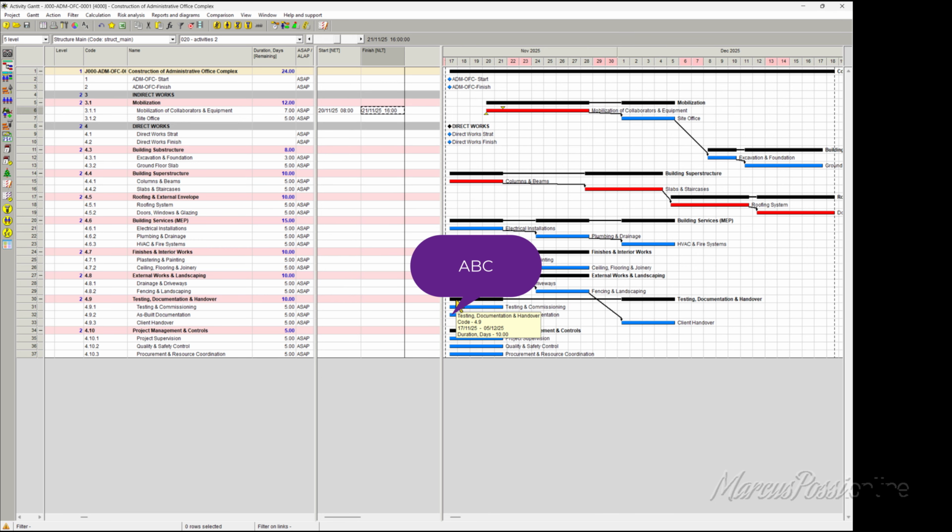Just press OK, and you see the sequence, and these 2 days are not work days, so even if it is continuous work, it will skip, because although it's continuous, it is continuous under the rules of my predefined calendar. Mamani, this activity commands finish to start this one.